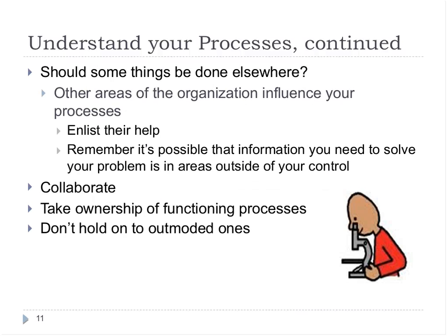Also need to make sure that you put in plenty of time for testing and training. One of the things that happens is bad things happen and we don't have enough scheduled downtime or problem-solving time built into our schedule, so the amount of time that we're going to spend on testing and training gets shrunken because we don't want to miss that project implementation date, right? And we didn't build in enough cushion days in advance. And that's really a mistake. We need to make sure that we allow plenty of time for testing and training because that's going to make the go-live date work so much more smoothly.